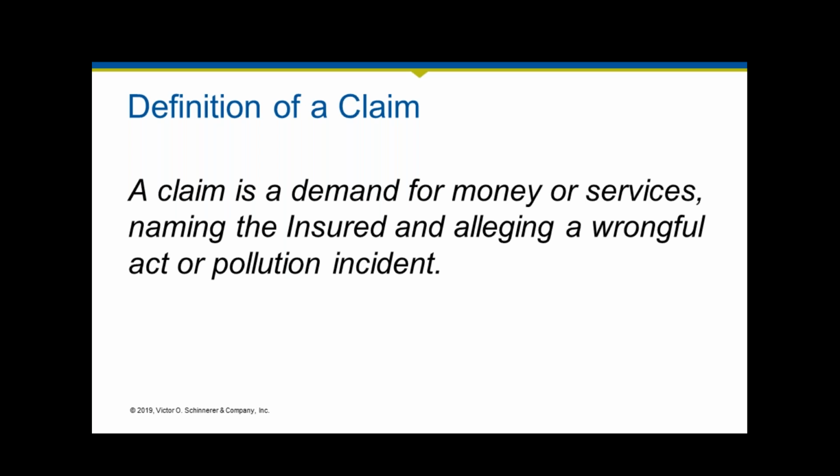One of the things you should always be concerned with in your contracts is when a client or perhaps a prime decides it should have the right to withhold money from you, because that's not a demand for money or services. If they have a contractual right not to pay you, and many developers do this, that's not the same as a demand for money or services.